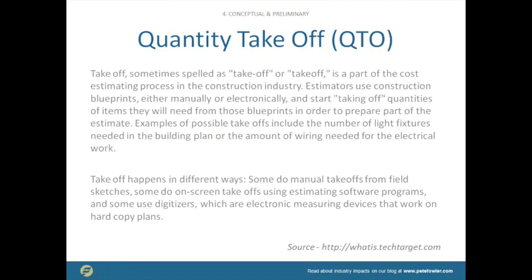Ultimately, you can't just say that's $1 a foot. Well, $1 a foot for how many square feet? How about if you're going to do just 1 square foot? You can't do 1 square foot of anything for $1, right? You can't drive out to the site for $1. So you've got to be careful about using quantities.